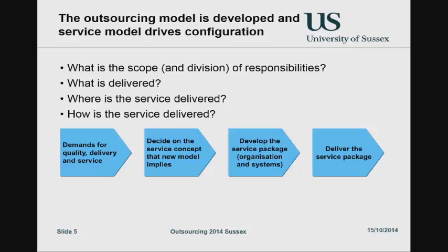Furthermore, in the Unilever case, they have inside their organisation what looks pretty much like a service desk operation which manages user requests that sit in parallel with the Unisys, unfortunate choice of supplier and buyer here. Also Unisys have a service desk operation facing off the clients, the real consumers. This is a recipe for confusion, and it's a recipe for not achieving any financial benefits.